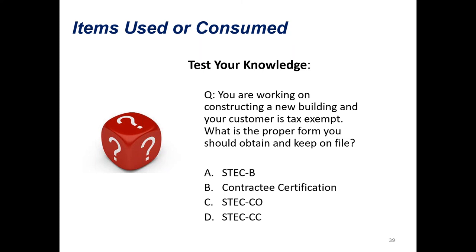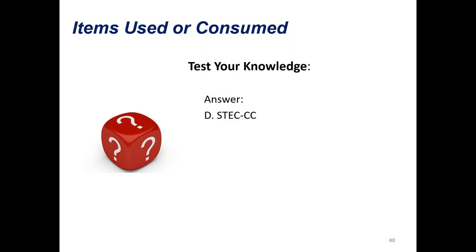Test your knowledge question: You're working on constructing a new building and your customer is tax-exempt. What's the proper form that you should obtain and keep on file? I'm going to go with D—the STEC-CC—because that's the one you get from your contractee. The STEC-CO is the one you fill out yourself. You are correct—the STEC-CC is the form you want to keep on file. As a contractor, it's really good practice to write the job number on the form; this will help you if you're audited so that the auditor can quickly reference your contract schedule to verify the job is tax-exempt.